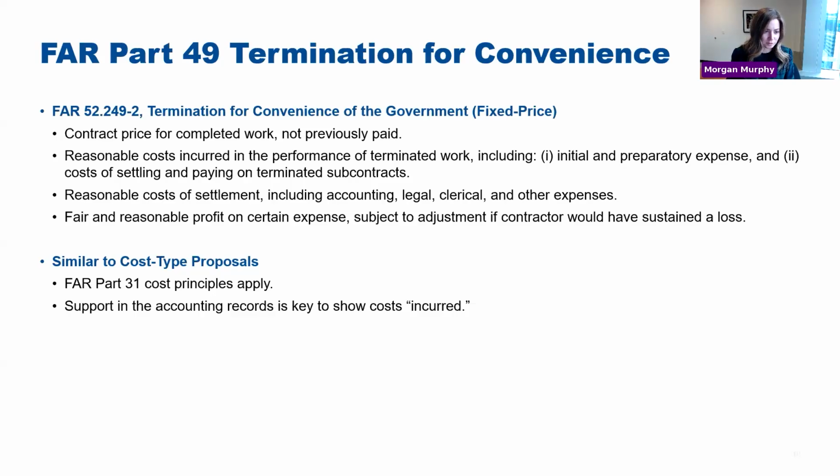And then just in the interest of time, I'll briefly note that the FAR Part 31 cost principles are going to apply. So just something to keep in consideration when we talked about having accountants potentially come in and tracking those costs. Just keep in the back of your head that you do have the application of those cost principles. And by the way, if you need accounting support or legal support for that matter, the clause explains that costs of consultants, of accountants, of legal experts to help you prepare a termination settlement proposal are generally allowable as termination settlement costs. So, if you need that help, it's very much there.